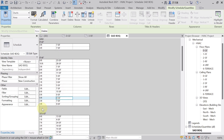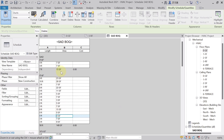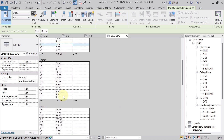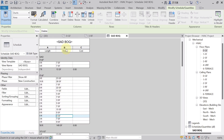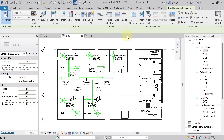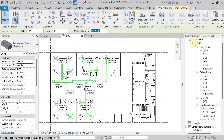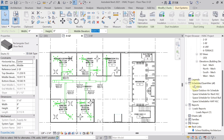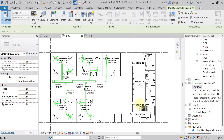To see totals, go to Formatting, hit Edit, select Length, Area, and Cost, then hit Calculate Total. Now in the footer you will get the total area and cost. The supply air duct BOQ is complete. It is saved in the Project Browser under Schedule or Quantity as 'SAD BOQ' — double-click to reopen it.